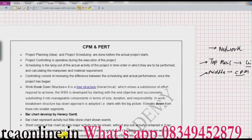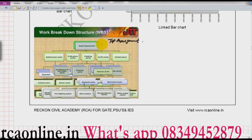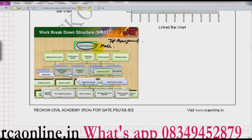Now, what is work breakdown structure? First of all, WBS is for top management. They are looking after the major part of the project. The major part is construction of a mall or hypermarket. It can be divided into further classifications like foundation, structure, finishing work, woodwork, infrastructure, electrical, and others. These parts can again be divided into smaller parts. So the total project is divided into different parts — this is work breakdown structure, and it is more of a hierarchy chart.